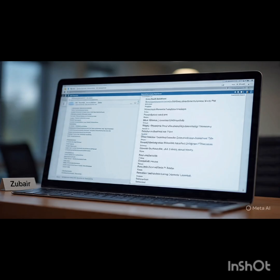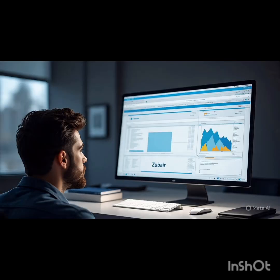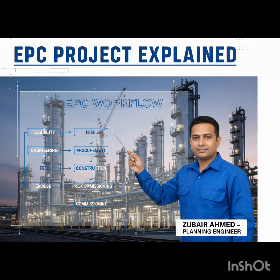You use logic like start to start. Maybe painting starts 5 days after steel erection begins, or finish to finish with time lags. It lets you model how activities realistically overlap. Right, because things happen in parallel. Exactly. And once all that logic is built in, the software can run a critical path method, CPM analysis.